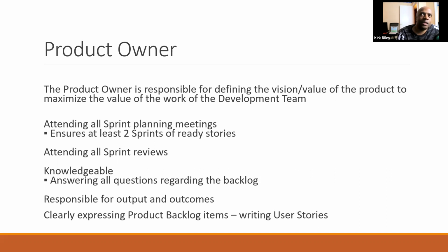So on the proactive side, if the end user is bringing a feature to the table that will reduce the number of trouble tickets created by our customers, then that would be a 10. A 9 would be something that will make it easier for the engineers on the floor to troubleshoot.